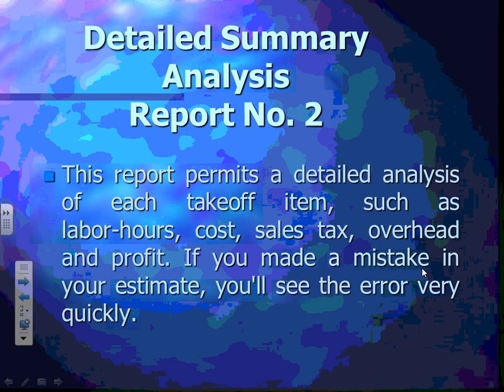In McCormick or Accurate, guys, when you put in your tabs, do you remember the tabs that you did? You can get information about every sheet, how many 3/4 inch conduit and THHN number 12 conductor for every sheet, for every room if you want to, for power, lighting, and low voltage. And what this is important, Karen, for you, when you get the job, you feed this information directly into what? You feed, Adam, this information directly into the project management, the guys who are going to be managing the project.